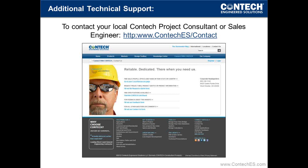How long do you have to typically wait between grout lifts? That's a great question. What we recommend to folks is the prior grout lift simply needs to achieve initial set. Normally it involves multiple lifts, and of course with the grout mixes that we're most familiar with, you can get initial set anywhere from an hour to 3 hours from when it's placed.